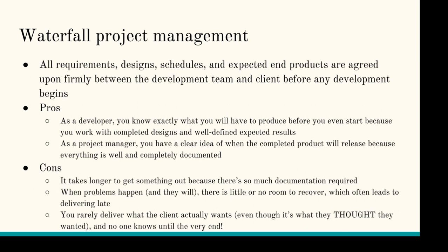Also, this is a big con, you rarely deliver what the client actually wants, even though it's what they thought they wanted, and no one knows until the end. So there's this ongoing issue where a client who doesn't have an understanding of technology says, this is what we want. And then as a developer, you have an interpretation of that, and you make it. And then you show it to the client, and they're like, that's not what I want. And then you say, but this is what you said you wanted. And they're like, that's not what I said I wanted. That's not at all what I wanted.